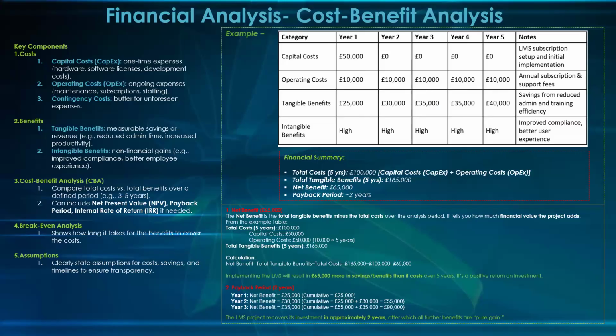Yeah, we started making profit even at year 2. Why? Because your total cost is 50. At year 2, we've broken even already, although we've not looked at our operating cost. By the time we add our operating cost, what I mean is that at this point, we've made over the money that we used in implementing it, plus operating cost. At year 2, we started making money.